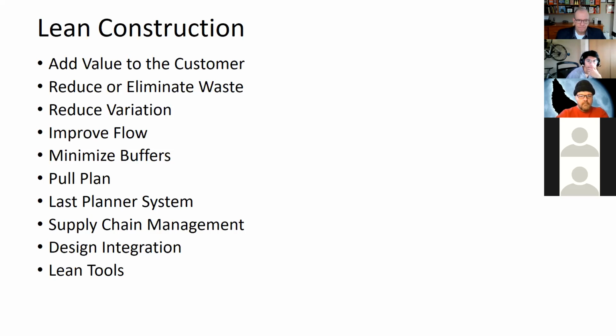It also means, if you're doing full out Lean, we can involve supply chains, because we've seen in the last year that disruptions in the supply chains can cause major problems, right? Yes, that's right, Robert. That's when we get into last planner systems. Should, can, will, did planning. Depending on what level you're at, whether you're at the milestone phase or at the daily huddles, that would be the aspect of last planner schedule breakdown. We'll get into that as well.